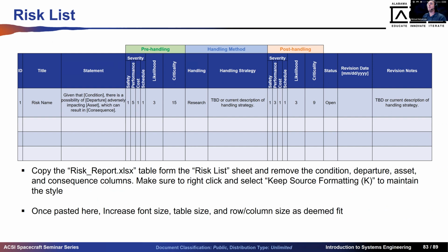Yes, there is. In the risk template, we have explicit criteria for what it means to be 1 through 5. And it says that explicitly. So you do not need to say, oh, I think it's 2 or 3. You can go and say, oh, it falls under this category. It must be a 2. Okay, thank you. Our goal is not to make it easy for you to succeed. It's to make it hard for you to fail. You shouldn't have to figure that out on your own, is the point.